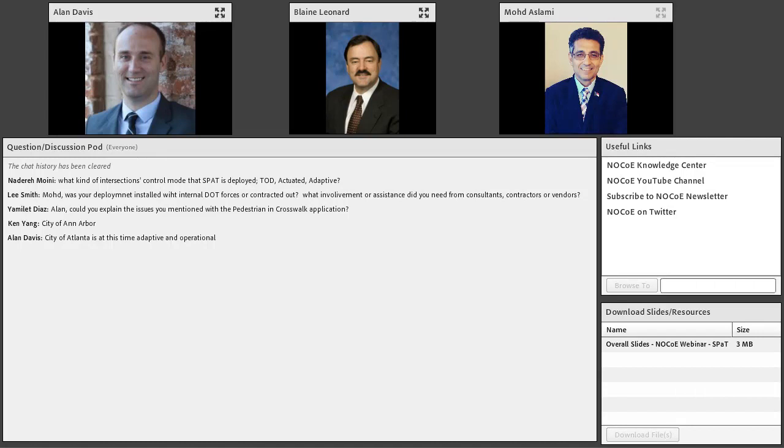They also described that in order to really verify your system, you need to make sure that the OBU that's receiving the data in the verification process is of a different brand than the RSU that you're sending the data with, so that you prove the interoperability, because the chance of a vehicle having the same brand of device that your roadside has on it is fairly slim at any given time.